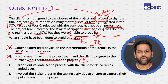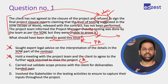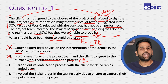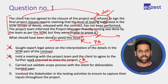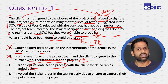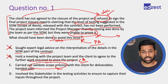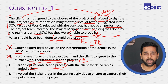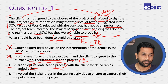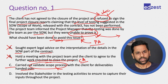Option C: carried out the validate scope process with the client for deliverables handed over. Validate scope process means getting deliverables checked with the customer, getting it signed off and recorded. If you had followed the validate scope process properly, the team would have been able to prove it, because the process ends with a document that could be shown to the customer. This would have helped in avoiding the issue. But is it the best option? Let us see D first.